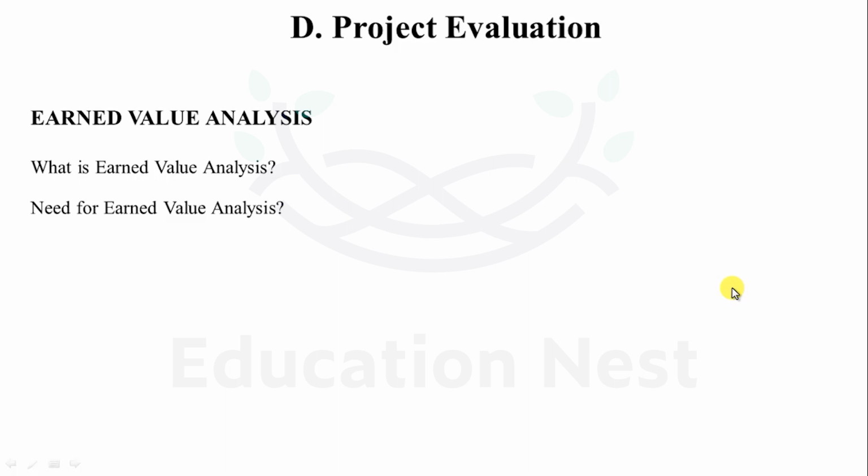How does it help them? It helps the management and the project managers mainly to measure the amount of work performed on any project at a given point of time, by which they can forecast the precise completion date and also the precise cost to complete the project. It helps the management to analyze between the schedule and the projected budget cost. Also, most importantly, it enables the management to take a proactive decision rather than a reactive decision when it's too late and the damage is done.